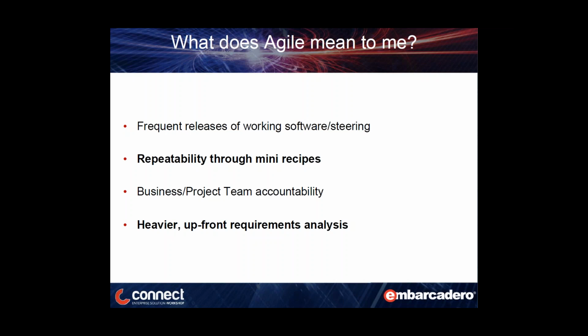Some methodologies, and in particular feature-driven development, have a slightly heavier upfront requirements analysis component. Instead of just sitting there with an end user and asking, what do you want in this project, or what reports do you require for this particular BI set, we sit down and do a little bit more analysis. We try to understand the system we're building or the warehouse we're putting together and come up with effectively a logical model. The logical model is built upon each time that we go through.